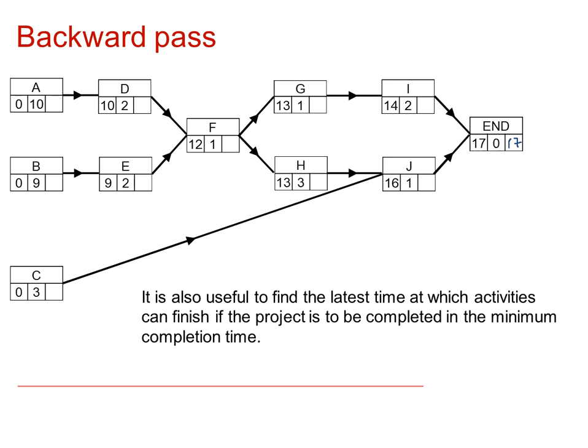and then working back, well, we take 17 from 0, and again they've got this idea if there's only one arrow coming into a point, so I, working backward, there's only one coming into there, so it must be 17 and 0. That can finish at time 17 and there won't be a problem, and of course J is also 17. Now going back from I to G, we've got 17 minus 2, so think about that.